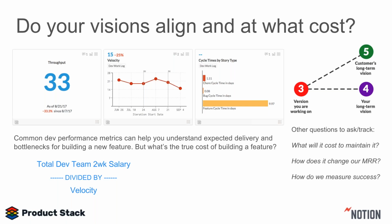And then you can point to these metrics and say, this is how fast our dev team is currently moving. Here are the things we already have in the pipeline. To build this feature out, it's going to take X amount of time, right? Or we're not going to be able to start this for X amount of time. And so that helps start that communication of aligning vision internally, right? But then also being able to communicate it externally to your customers around delivery or any type of expectation as to whether or not that feature is going to be built.